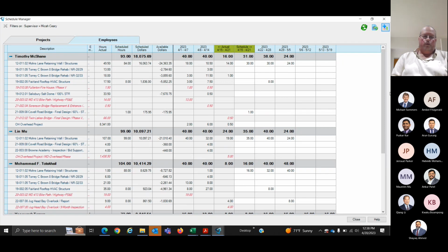So let's say you've assigned, like in this case, Marine's assigned to a given project. So Shaq is really screaming, he needs to have this done. So Marine's got a bunch of hours there. Well, let's say Frederick County is also screaming and I've put in hours for her all on a different project. Now what you can see is all of a sudden we've got an overload. So this becomes something you can use, one, for tracking resources by the hours.